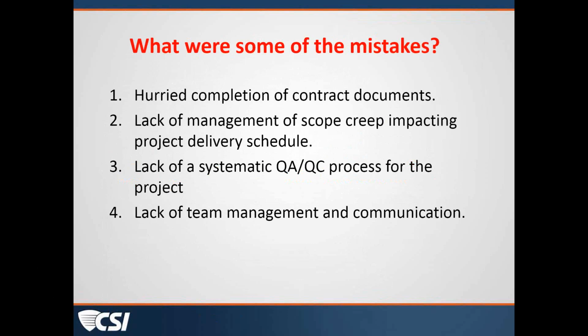Doug? They are professionals. They are expected, is that static coming from me? I hope not. They are expected to know how to construct a building, and they are expected to, and obligated by the contract to, inform the architect and the owner if they are aware that there is a problem with the documents. But the key there is that they have to be aware that there's a problem. And if they don't know, and it's not something that they should know, then they're not going to be responsible for your mistakes in your documents, if that makes sense.